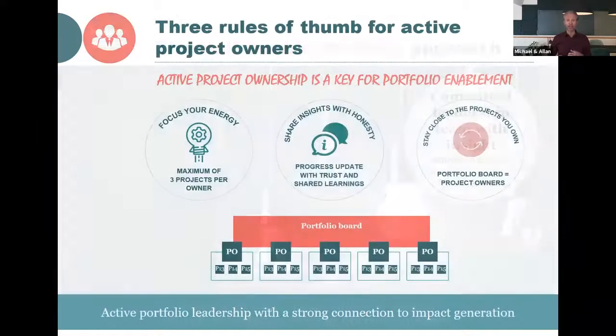So in this case, we would suggest that the portfolio board would have, let's say, 5 people, and then they would have access to run 15 projects at the same time. They will each pick 3 projects related to the strategic grid that you saw before and the impact grid, projects that they think are important to them and the business they are creating. Having 3 projects each is what we favor, and then you would leave the rest to your great colleagues in the board. This also gives a cap on how many projects we can run at the same time.